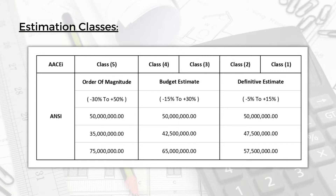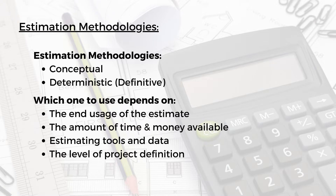This is how the AACEI and the ANSI classify the estimation classes. When we come to estimation methodologies, we have two: the conceptual methodology and the deterministic or definitive methodology. When to use the conceptual and when to use the deterministic depends on the end usage of the estimate — is it just screening or feasibility, or is it a bid or tender?